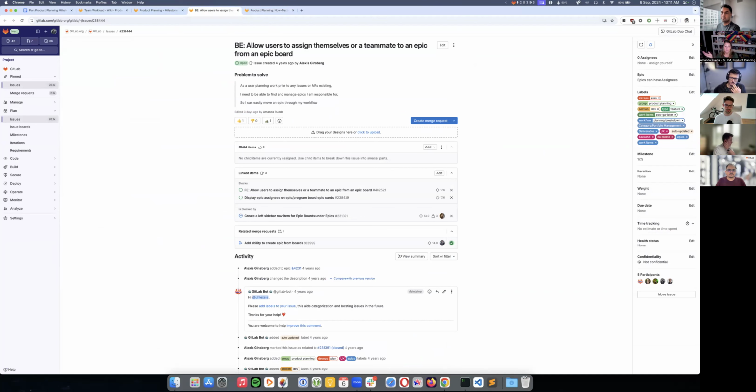For the filtering. And then I will look for where we are in the drawer. We can't do the drawer until all the UX stuff is done anyway. So we should put our efforts in the UX, which is already in this milestone, and then that will be the plan. So I'll update the issues to indicate the new plan. Thank you for talking through that.